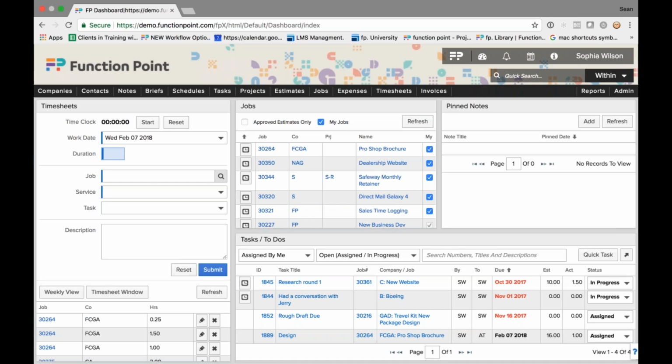I'm just doing a question here about the hours tracked against the task and what will happen if you pass the task around, and where the hours are or who the hours belong to. Okay. So, Thomas, did you want to field that in the webinar, or are we just going to field that as an email response? I'll just reply to the user here on the webinar, but right now I would just like to say that the hours are all tracked against the task, accumulated onto the task, but it's split between the staff members.